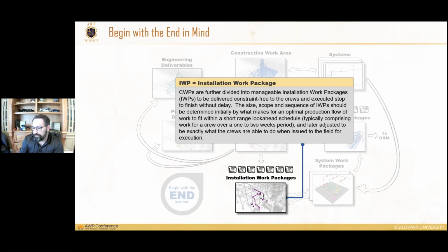One example I'd like to give is if you're in an underground program and you're installing risers from an underground header for drains, you're only going to get opportunities to install the risers and tie the risers to the headers in certain intervals. Usually you're going to tie that program to a foundation program, and you're going to come up from the header with the riser when the foundation is being dug and the forms are in place and being worked on.